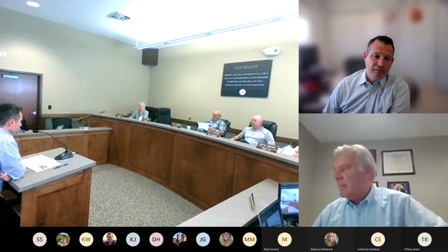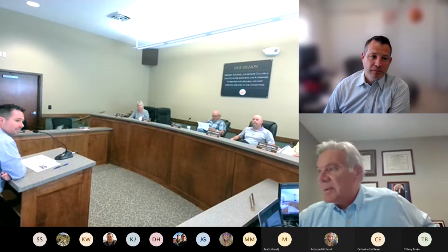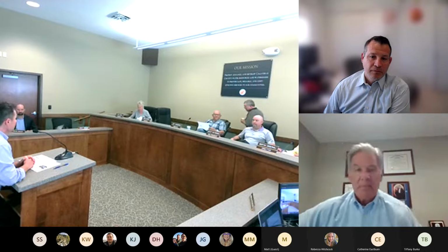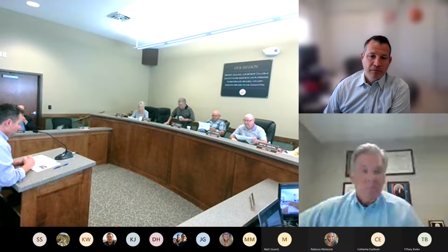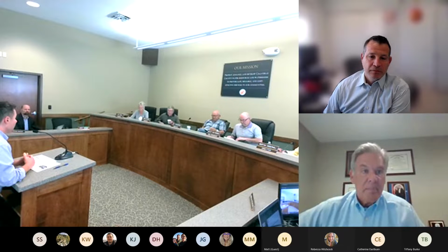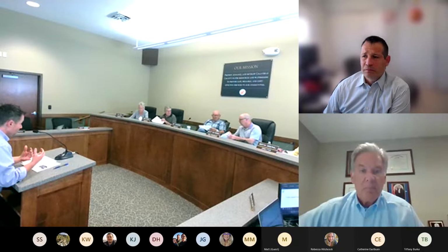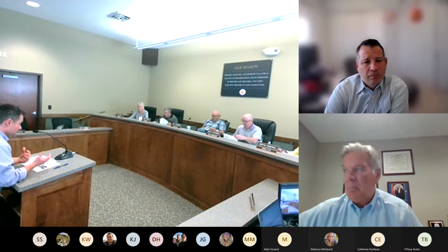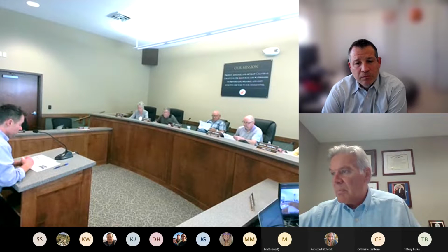Good afternoon, President, Vice President, Directors. The first slide you have before you is our capital improvement plan development process. In your staff report, table 1 is our list of all of our projects. You'll see there's roughly 50 projects. We take that list and get feedback from our operation and maintenance team, because it's truly a team effort. We evaluate that list annually and identify new projects and any changing priorities, because we want to make sure we're using our limited funds on our most urgent project needs.